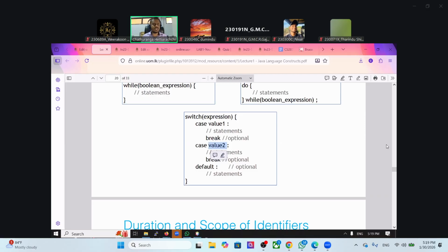How do you modularize it? How do you make sure that there are different modules which you can allocate to different groups or teams of the company and different individuals, so they can build it independently and then you can combine them together? Because if you wait until one component is built and only then move to the next one, sequentially, it would take a long time. In the software industry, you can't wait a long time. You have to do it today.